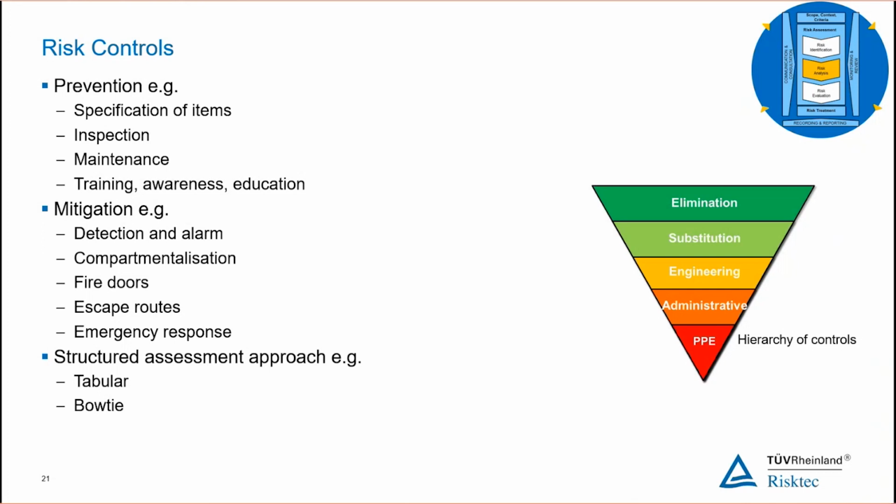But when we're evaluating those controls, the controls we've got in place, we can look at the adequacy of the controls, but also the type of controls, such that if we are looking at one scenario and all of our controls are engineering based, and we're looking at another scenario and all of our controls are people based, then it should raise a question to ourselves. Okay, are we managing this as well as we can do? The second scenario may have less controls in place. We can't make that decision now, but it's a flag, it's a warning sign. It's a consideration for us to look at.